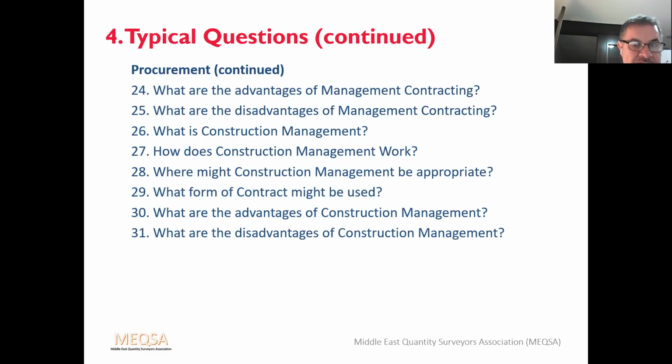And the disadvantages: price certainty is not achieved until the last trade package is let. Changes to later packages may adversely affect packages that are already let, which is expensive. It needs an informed and proactive client, and the client has a lot of consultants and contractors to deal with, not just one, which means more fees.